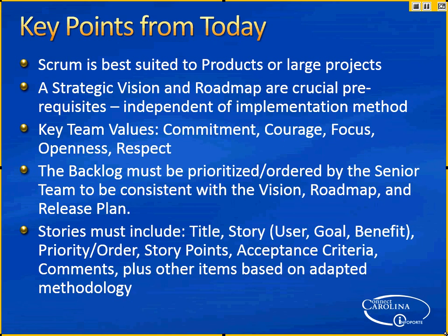Yeah, and that actually is part of the evaluation at the end of the 2 weeks. It is possible that at the end of the 2 weeks you had planned, I'll make this up, 20 story points. You got to the end and 16 were complete, done, as step 9 defined. Done. 4 are still hanging out. They may be all around completing testing, and that has to factor into the planning for the next sprint. So part of the next sprint is completing that work plus the new work. Thank you.